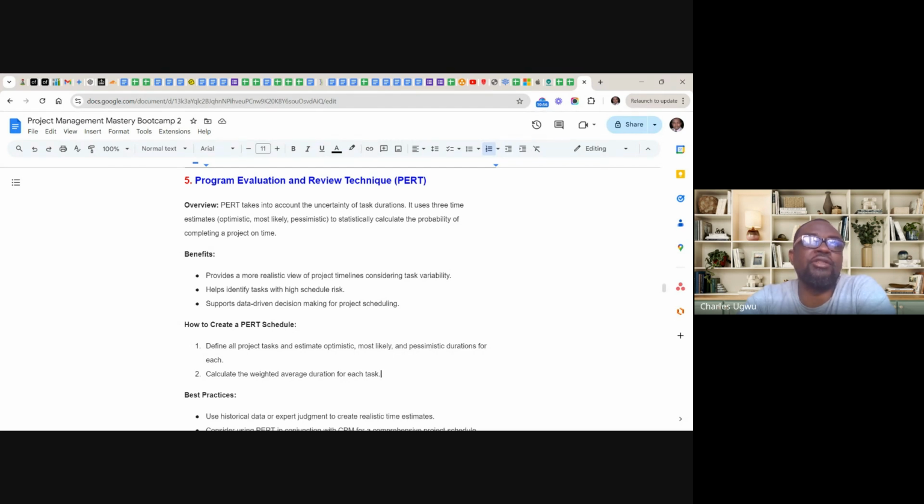You can't do that as a project manager because you are not the one performing the task. You have to agree with the people performing the task before you can put a duration. I have to make this clear so that you won't cause confusion for yourself. You say, I'm a project manager, I know you can do it in 2 days. You don't do that.